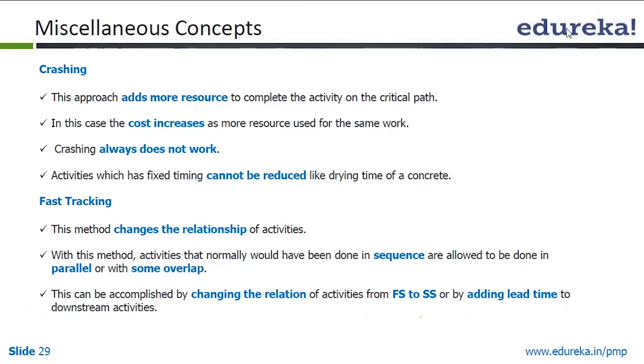Sometimes in crashing, what you also do is you change the resources. Like a less experienced resource is changed with a much more experienced resource who can develop things or deliver things faster because of the higher productivity. That is also possible. Here also the cost increases.